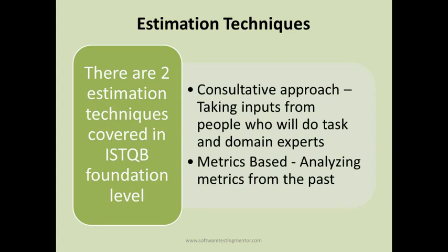The one is the consultative approach and the other is metrics-based. The consultative approach is the estimation technique in which you take inputs from people who will do the tasks and the domain or technology experts, and estimate what time will be required to complete the tasks. The other is the metrics-based approach, in which you analyze metrics from past projects and estimate your current project tasks based on the past metrics.